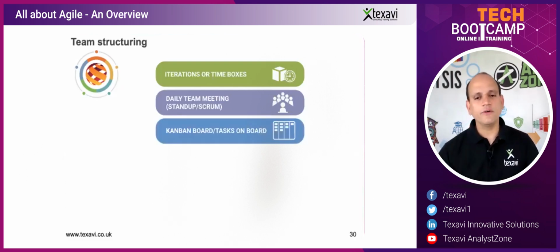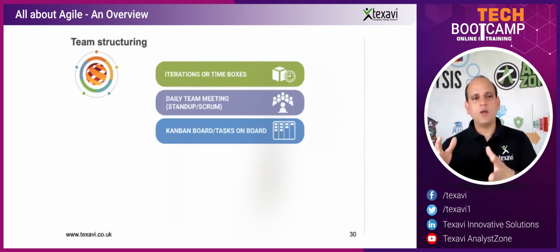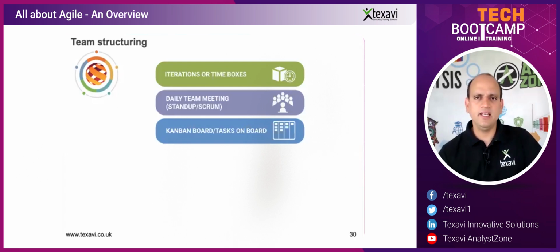And then we use a lot of Kanban boards. So this is how we actually maintain the requirements in the Agile context. Again, we'll talk in very detail later. This actually is like a Kanban board. So here on this side, we can have the backlog, all the things to do. This could be things that are in progress, or these 2 items could be things that are ready for review, and this is done.